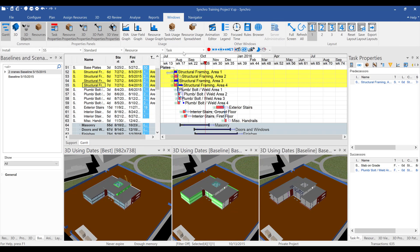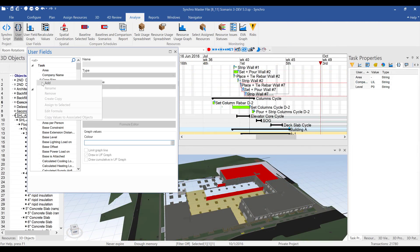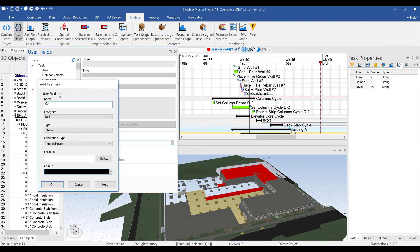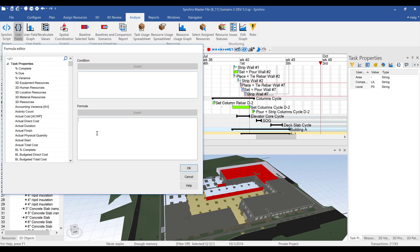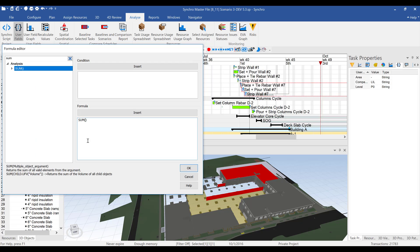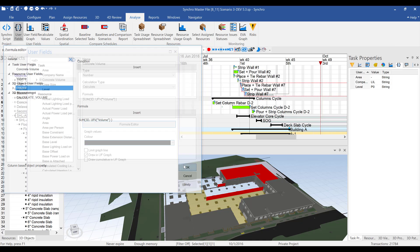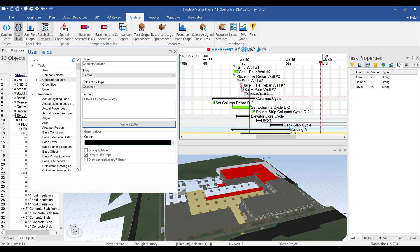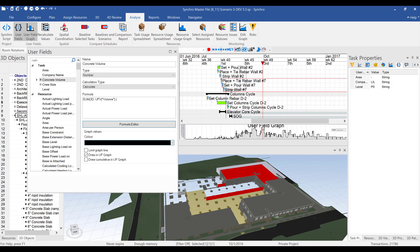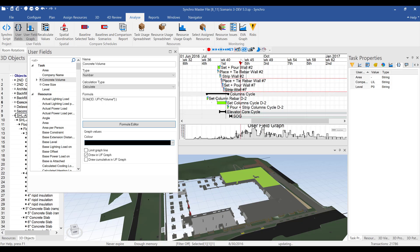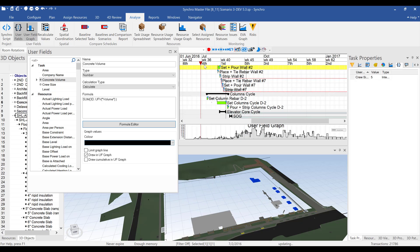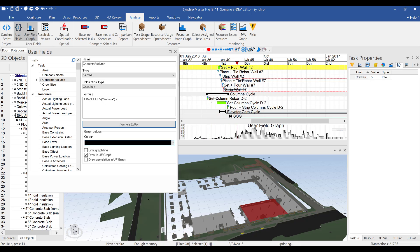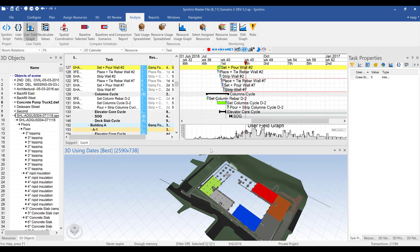Now visually interrogating the model is great, but at some point, you'll also want to start using all of the data that comes with the model. And although Synchro's calculated user fields and scripting features allow you to practically do anything with your data, it's good to start with something simple. One simple example would be to take the volume quantities from all the 3D concrete elements, aggregate the numbers depending on how they are grouped in the activities of the schedule, and then plot the concrete histogram to figure out how many trucks will be coming on site on any given day. You can then use the 4D viewport to see exactly where the ports will be and how the trucks can be distributed.